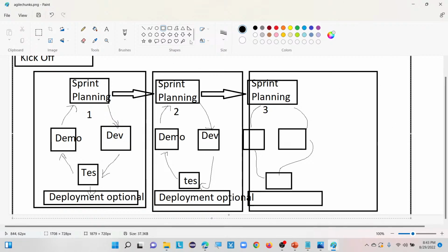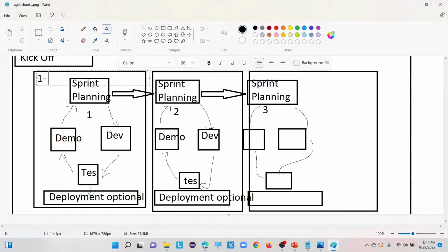Inside this, we divided our project into different chunks. Then we are following some iterations here. These are different kinds of iterations, but we can better call them different chunks or modules. For each and every module we are using the iteration process. Before going to the next iteration, the duration for each and every iteration is 1 to 4 weeks.